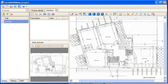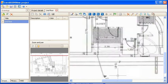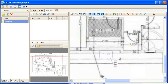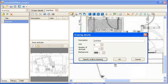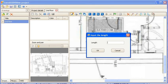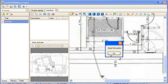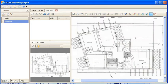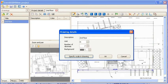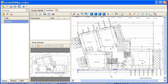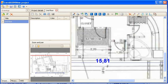You can adjust the drawing scale by picking a dimension on the drawing, entering its length, and then marking its two endpoints on the drawing. This process helps to eliminate scale distortions caused by photocopying or scanning.